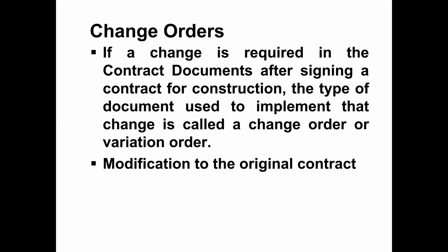So change can be generated from the owner side or from the consultant side, or there is a construction change necessity required by the project requirements. But all these three parties have to sit together and agree on that change order, how much will be the price and how much will be the time. So this is the price of the contract and this is the time of the contract. Now with this change, how much is the increase or decrease in price or time? What is the impact of this change?